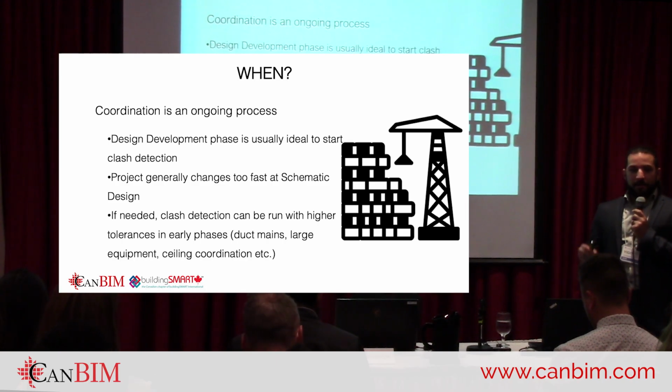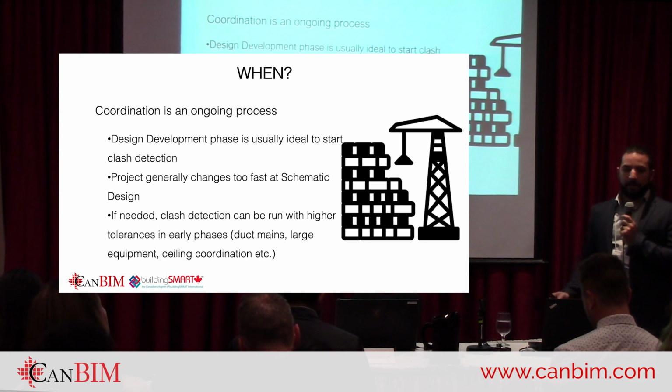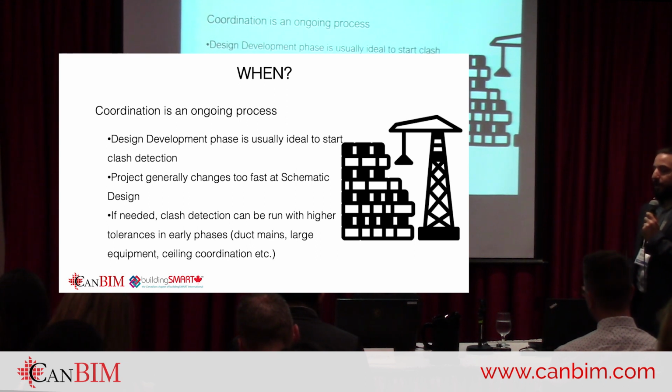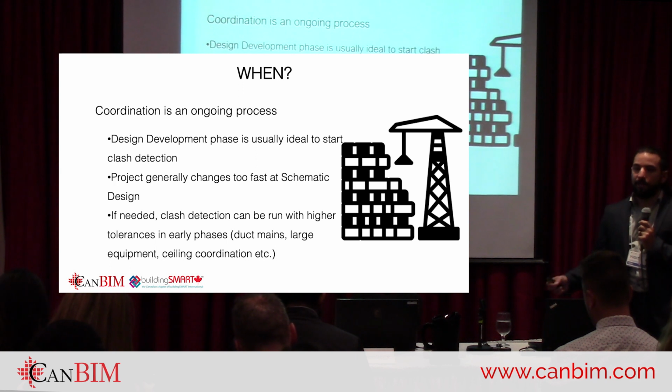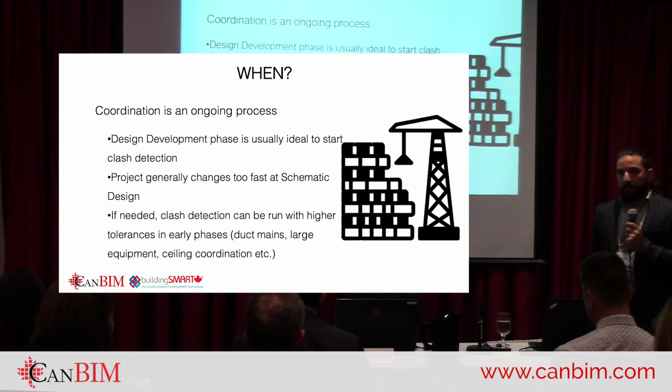There is no way in the last 2 weeks people are going to work on clashes and actually resolve them. It's just everybody is in panic mode already, and they're doing all these last minute changes. It's unlikely to happen. So it's better to have this as an ongoing process than limiting it to this much time before the submission.